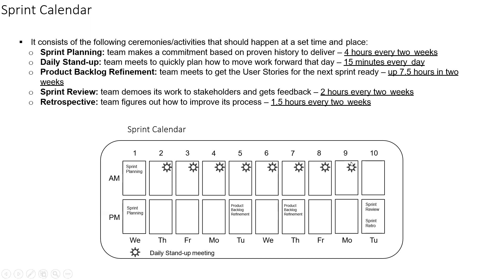From day two to day nine, every day we will have a daily stand-up, which is also called a scrum meeting or simply a stand-up meeting, where the team quickly assembles to see how they are making progress. Each member of the team would talk about three things: what did I do yesterday, what am I planning to do today, and if there is any blocker. The daily stand-up meeting should not take more than 15 minutes each day at the beginning of the day.